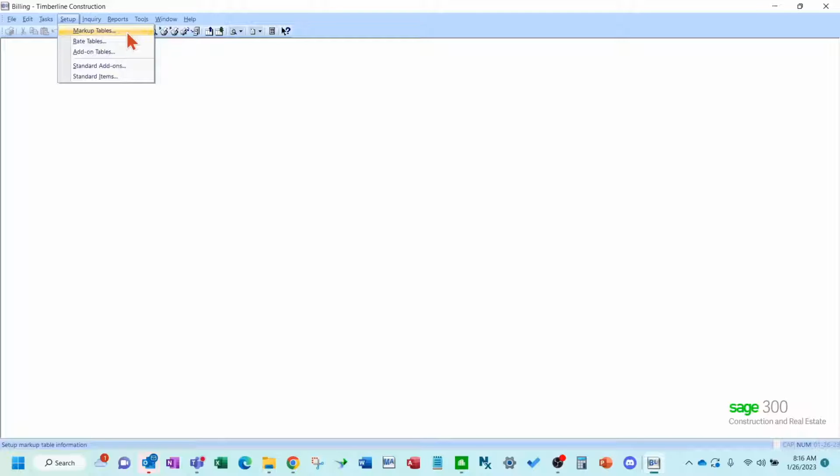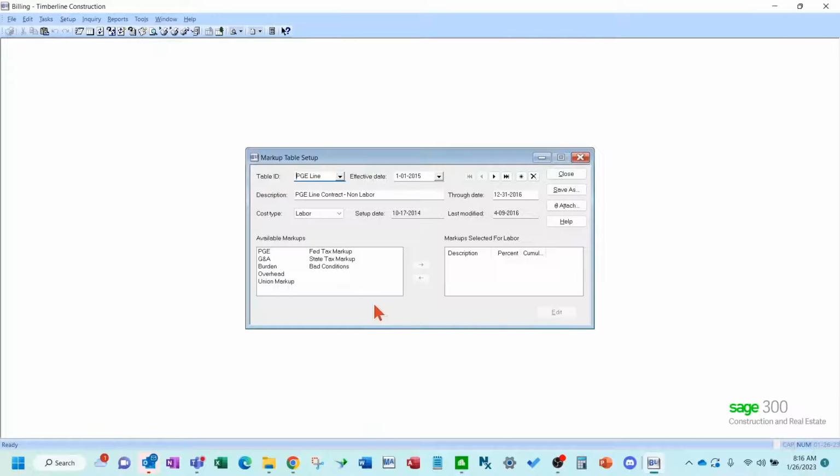So you want to create a markup table for anything that is material that has a 5, and then you get a 5% markup on it. Okay, so you come in here and you can do that with different markups. So your markup table has to have first a standard markup.